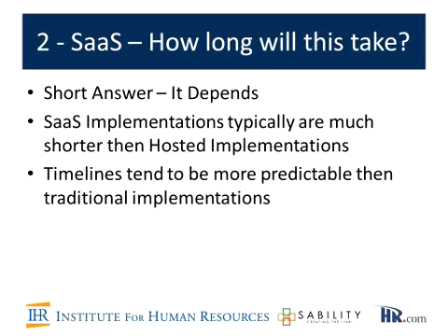Another reason why things tend to take shorter periods of time is the environment issues. When you don't have to set up the app server, the middleware, the database, I mean, how many times have we gone through implementations where we're down for 4 days because something was happening in the middleware on this new software, where everything's not talking to each other? You call in the vendor, and oftentimes it's not the vendor you're doing the implementation with, and it was just one setting that needed to be changed, but you lose a lot of days. And you've got this nice project plan, and everything's got to get pushed back a week.